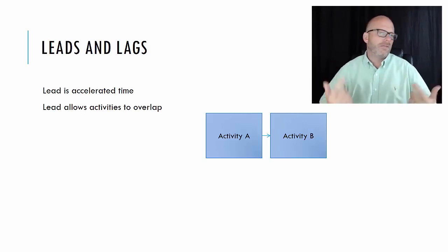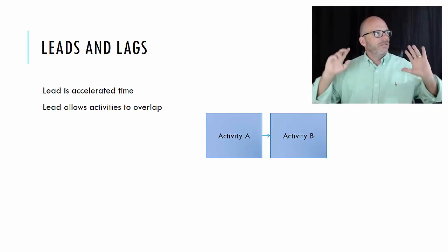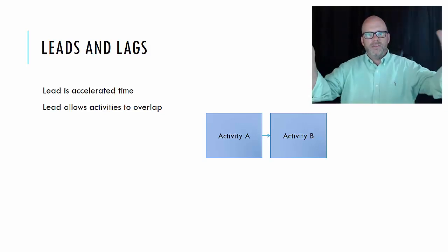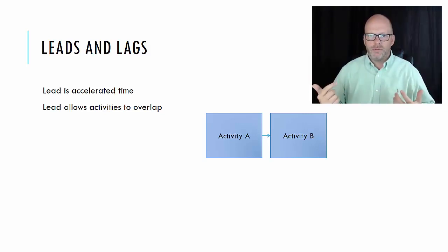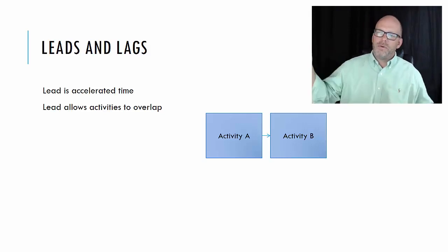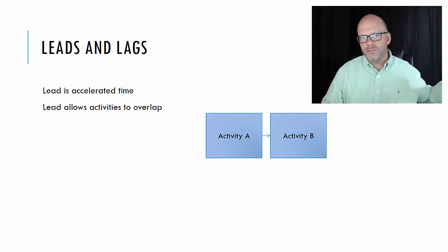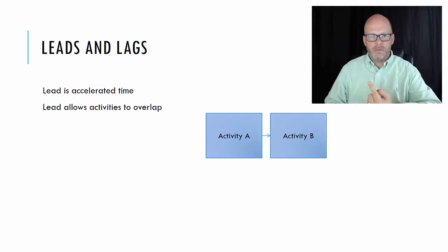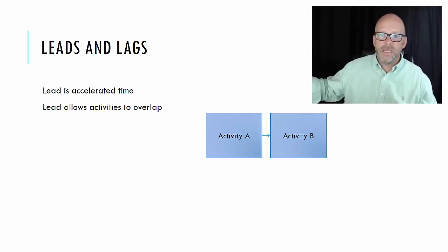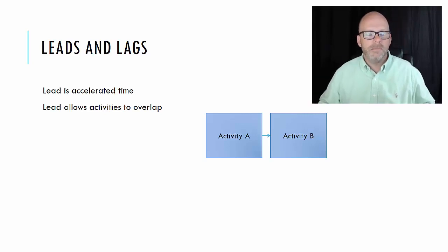So, an example: let's go back to painting those hotel rooms. We're going to have one person that does the priming. They prime the walls, and let's say it's a big room, it will take them 3 hours to prime all the walls, all of them. Well, the primer only needs 30 minutes to dry or cure before it can be painted on.